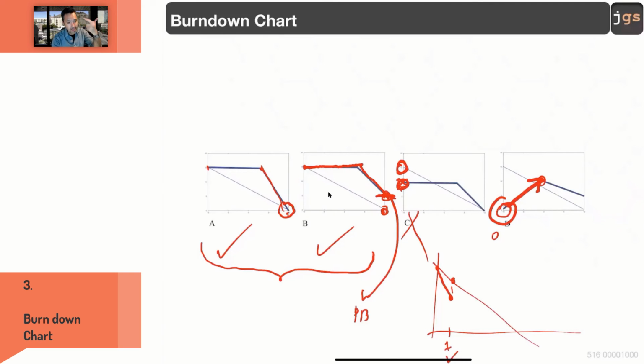If you move up, basically you're telling me that you are adding things to be done, or that something that was complete the previous day is not really complete the next day. If that is the case, you update the previous day. It's not like I go down and then go up again. You do not go down in the first place. You make a mistake reporting the previous day, okay, let's fix it, and the line is going to be flat instead of down and up.